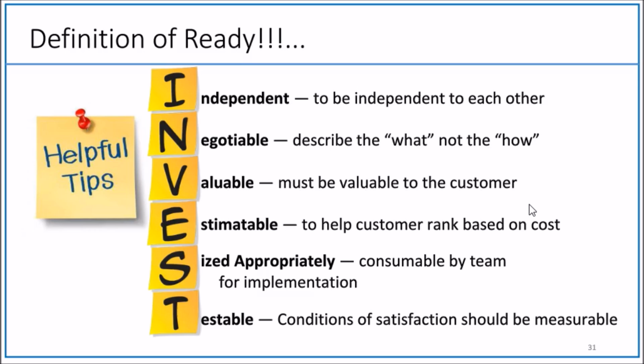If these things are not available, then the team can simply say, look, product owner, I don't want to take up the story. The story is not ready for sprint. Please, we need to do some more groundwork on it. So definition of ready is when the team can pick up a story. Unless these items plus some other customizable items the team wants to add are satisfied, that's called definition of ready. Definition of ready means INVEST plus some other items the team thinks. So these items need to be completely satisfied, then only teams can actually accept.